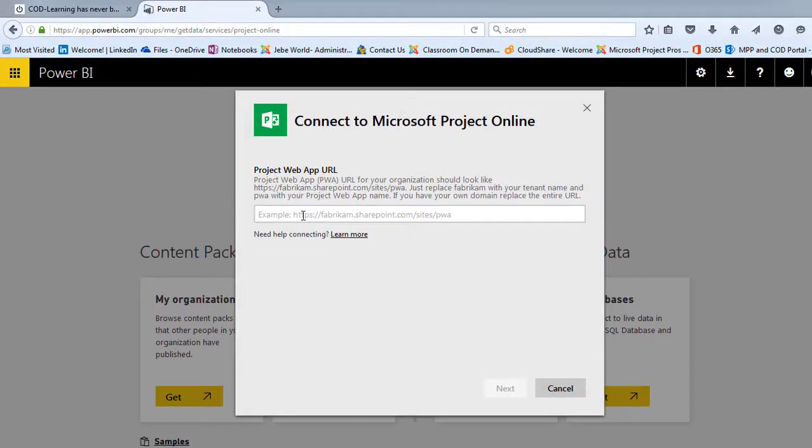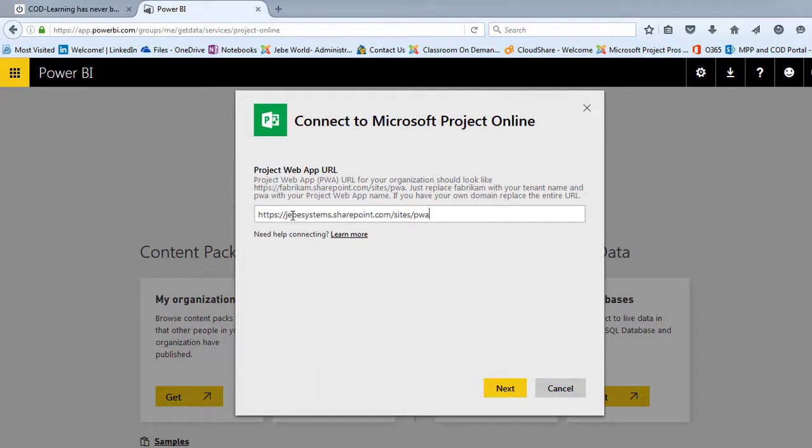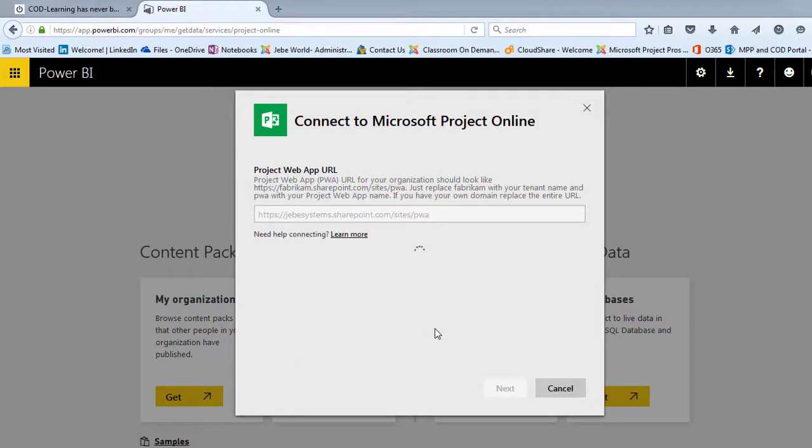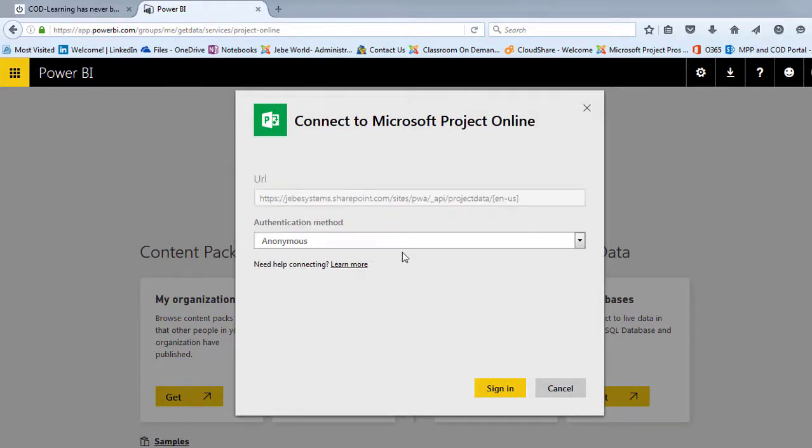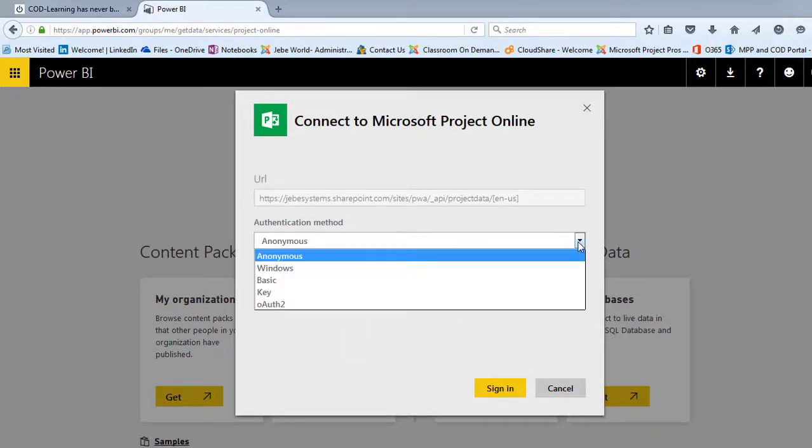And the first thing it's looking for is that URL. So I'll go ahead and paste that in there. Then I'll hit Next here. And so these next few steps are basically looking to authenticate the user. Well, in this case, I'm going to use OAuth2.